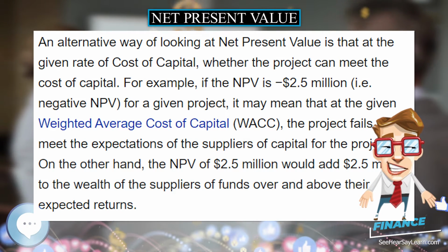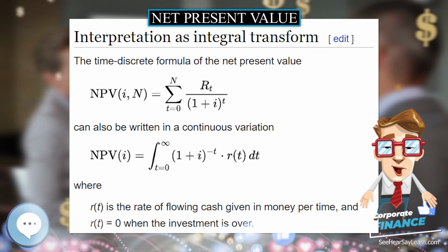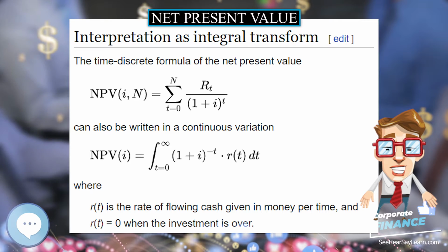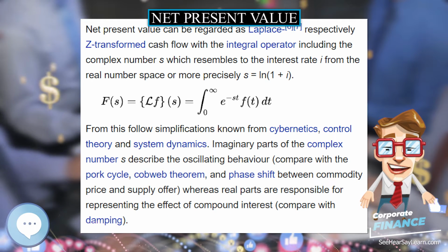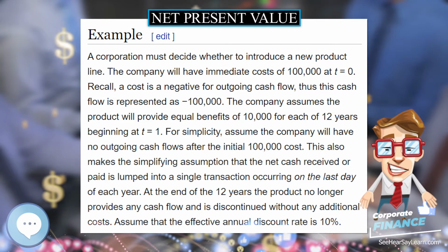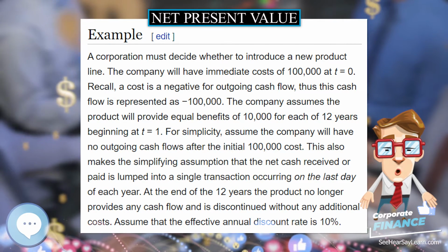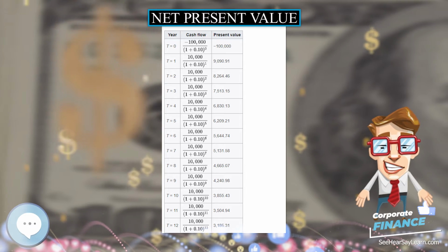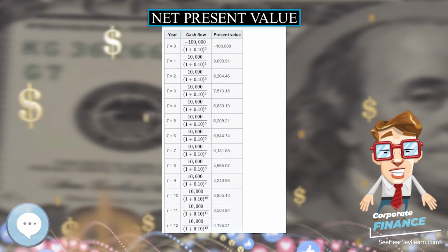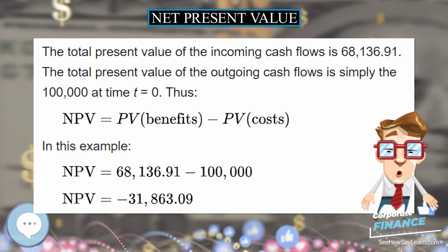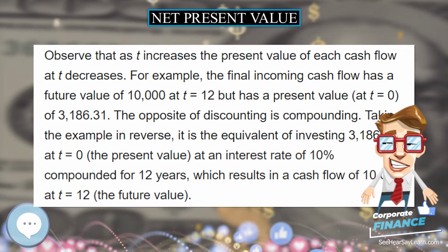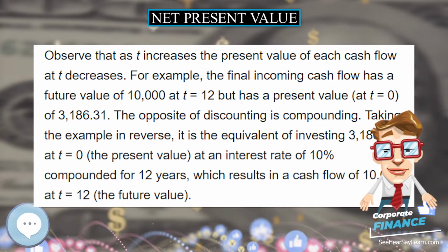Using variable rates over time, or discounting guaranteed cash flows differently from at-risk cash flows, may be a superior methodology but is seldom used in practice. Using the discount rate to adjust for risk is often difficult to do in practice, especially internationally, and is difficult to do well. An alternative to using discount factor to adjust for risk is to explicitly correct the cash flows for the risk elements using RNPV or a similar method, then discount at the firm's rate.